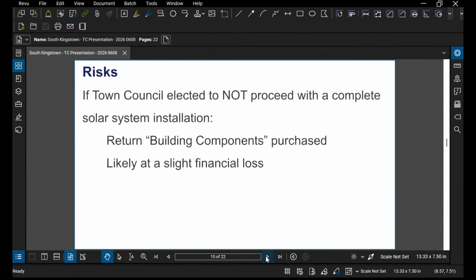Sure. Just one item to note, the safe harboring costs that we'd be looking to move forward with, we'd be looking to procure off of the master purchase agreement for pricing that's been negotiated with the state. Just to be able, from a time perspective, with how time critical this is, we'd be looking to procure that $80,000 roughly quote. I think it is going to be a power optimizer.